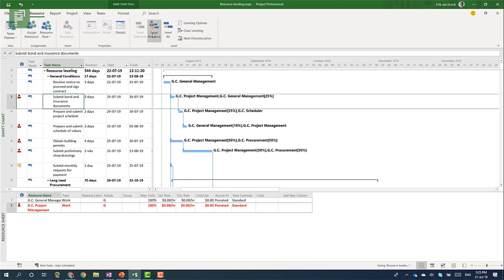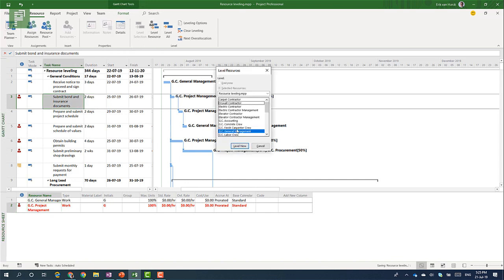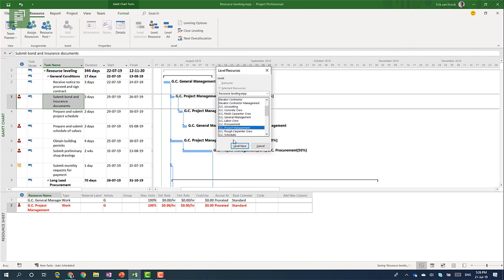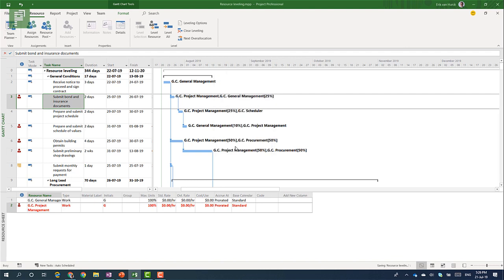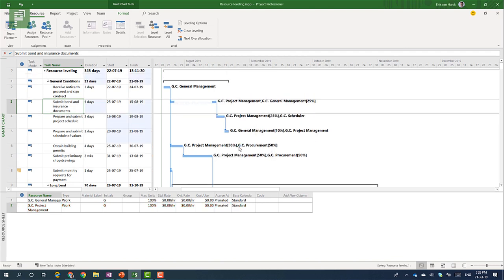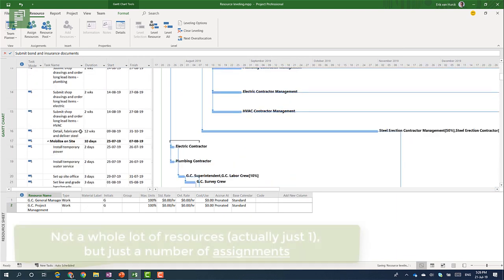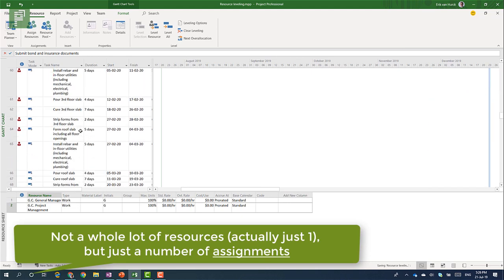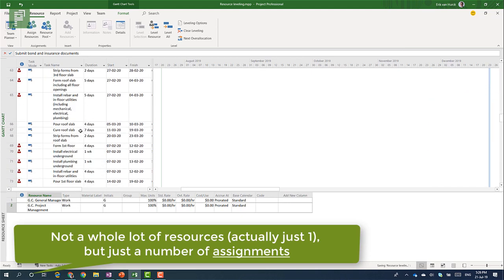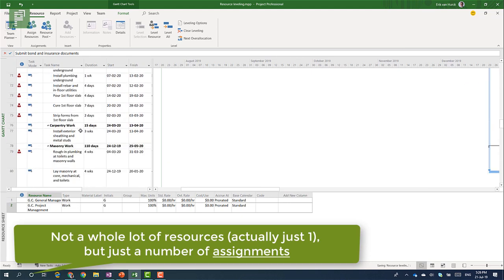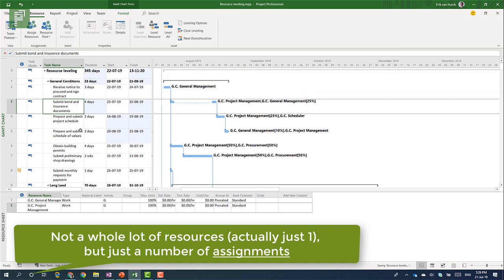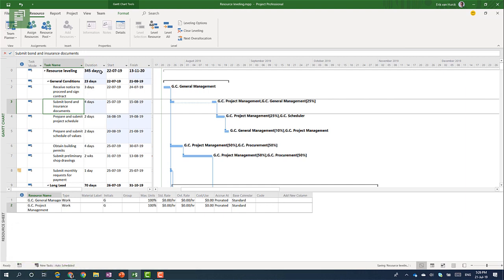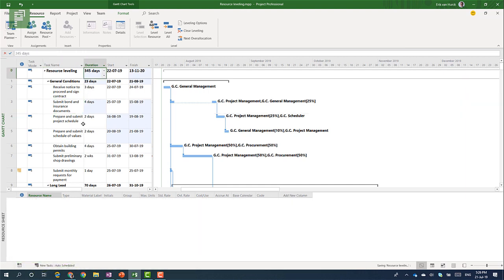And now we'll know project management is over allocated. So let's see if I click on resource leveling I can also select the project manager. And if I click on select now I see that there's another switch for a whole lot of resources. It doesn't solve everything in the schedule but we do see that a number of over allocated resources now have been taken out of the equation. And the duration of the project has been extended to 345 days. So leveling a single resource might make sense if you have a very critical resource that you know is highly requested and you want to have him not being an over allocated resource.